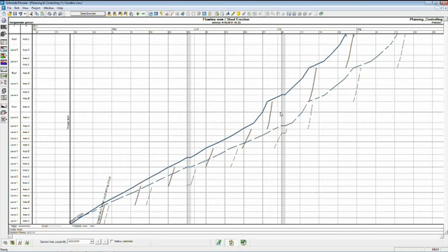And of course, a delay in steel results in a delay in the successor activity of shakeout and wind tack metal deck. So what was originally planned on being finished before the first of the month, before August, now is projected to be completed on the week of the 15th.